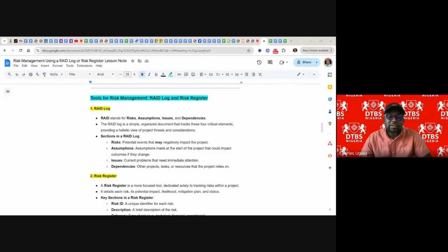It's no longer a risk. It has happened already. We've been working hard. We have 6 months to deliver this project. We work so hard not to exceed these 6 months, but on the last day of the 6 months, we have a deliverable that will last for about 1 month more. So this is an issue. It has happened. So what do we do? We deal with it. It is a problem now. It's no longer a risk. It is a current problem that needs immediate action.